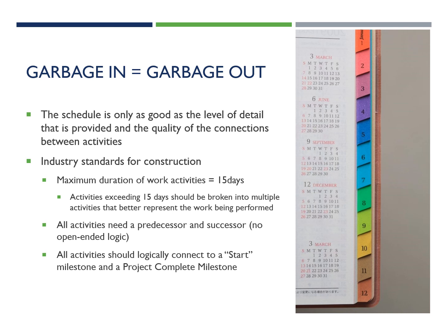So in order to set a standard, these are some of the industry standards that we have for construction. Maximum duration of work activities is 15 days. And that's essentially 3 weeks. Anything more than 15 days needs to be broken down into more detail.